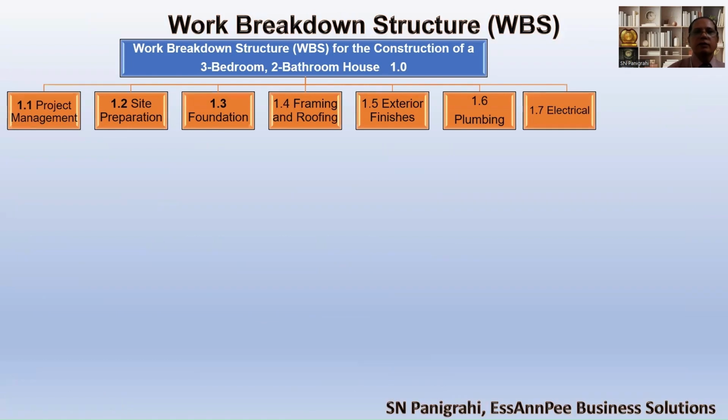So here we are coding like 1.1, 1.2, 1.3. This first level is about the control account, for better controlling of the activities down the line, so that we have better control over spend analysis and can easily trace the progress of the project. For that reason, proper coding is required.